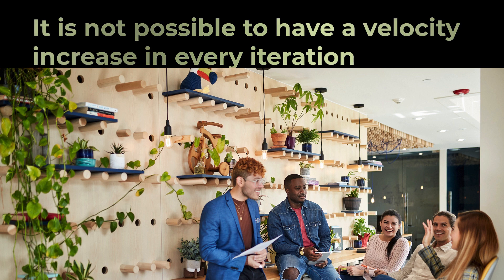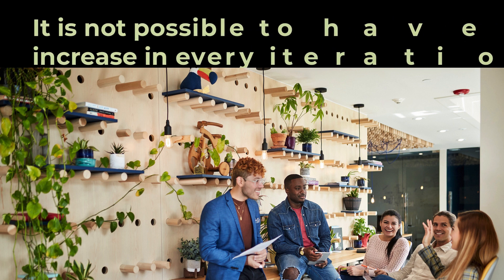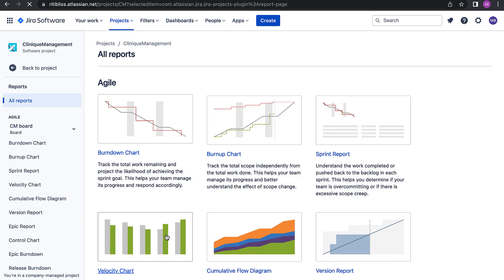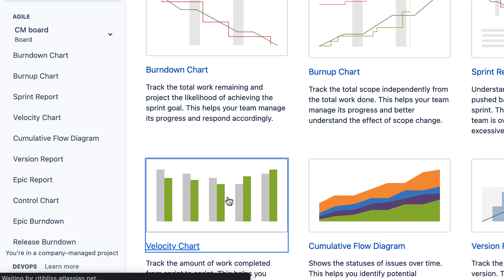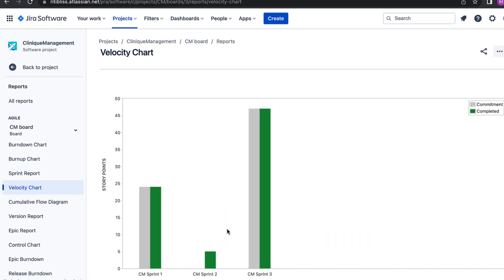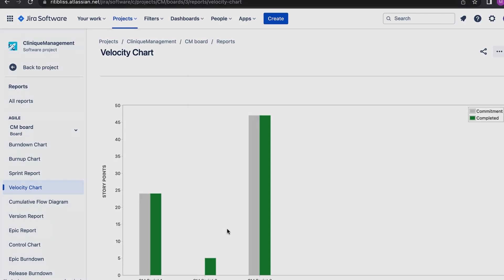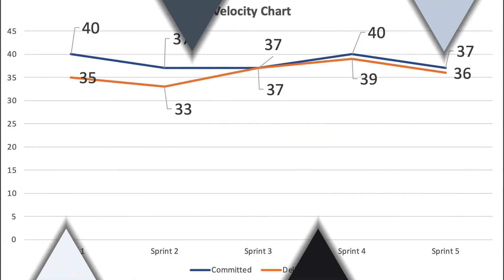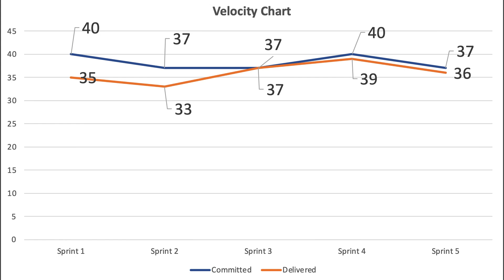Let's now see how to generate and view velocity charts in Jira. Velocity charts give a picture of multiple iterations and we calculate them after an iteration or sprint completion.